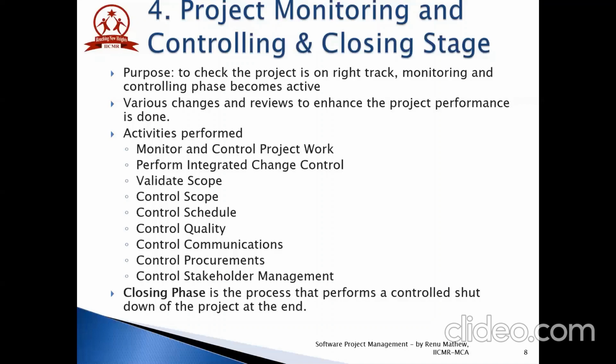In control cost process, the baseline cost of each deliverable is compared against the actual cost. The cost baseline should change only in response to a change request that has gone through the perform integrated change control process. Control cost ensures that your projects stay within funding limitations.